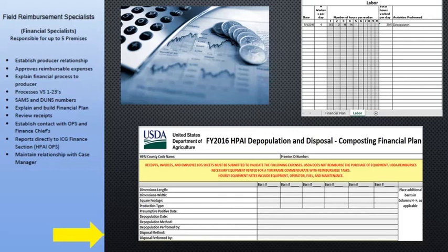Also learned, like Kim said, when it comes to financial paperwork, we need one voice. We need one person that makes a decision on what can be disinfected, what we can pay for, what has to be thrown away. In 2015, out of necessity, we used case managers like that, but we have figured out over the last 3 years of training and working on these processes, trying to hone them down, we need one person making the decisions about the money on any one place.